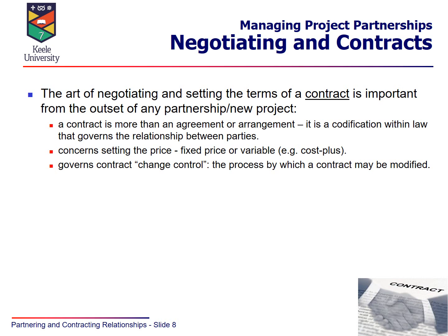It's a codification within law. It's the legal binding contract that governs the relationship between the parties. So it doesn't just involve setting the price, but also might well govern things such as change control, the extent to which we can modify the contract, and the way in which we work within the partnership.